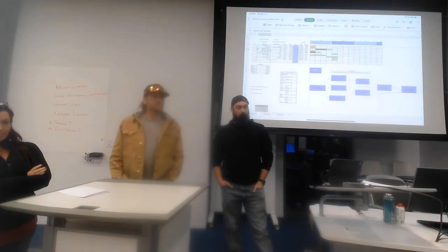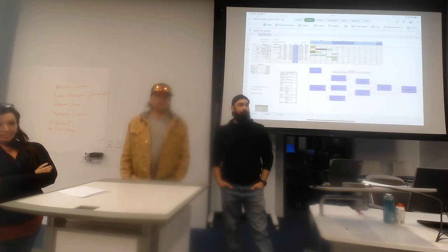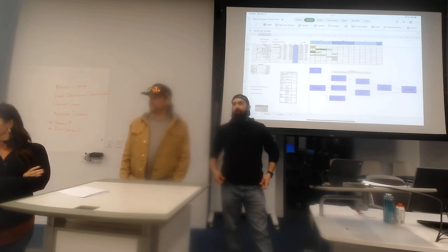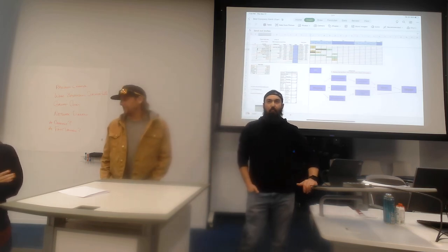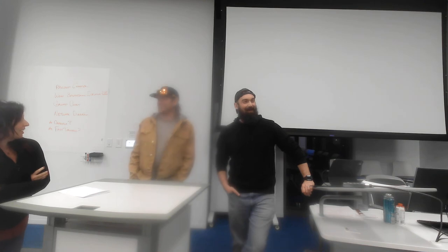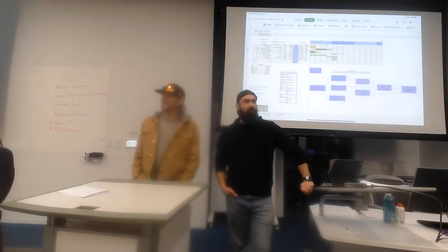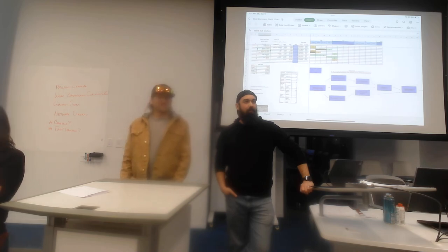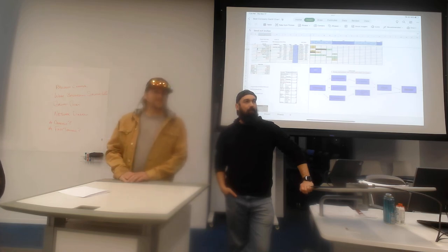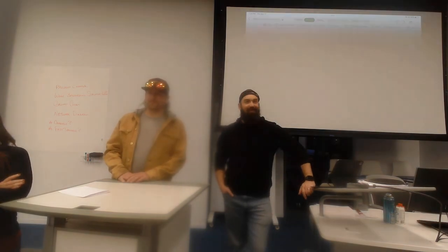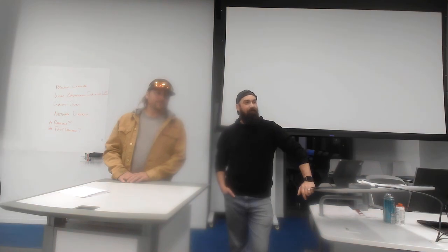So, the last two presenters, both teams talked about risk analysis. Well done to think about that. And I don't know, the DJ not showing up might be a higher risk than you think, because what are you going to do if they don't? Beatbox. Okay, if you've got a playlist already made up, that's your fallback position. So that's how you manage the risk. And you talked about risk as well from Salmonella. What was your risk? Run out of food, yeah, okay.